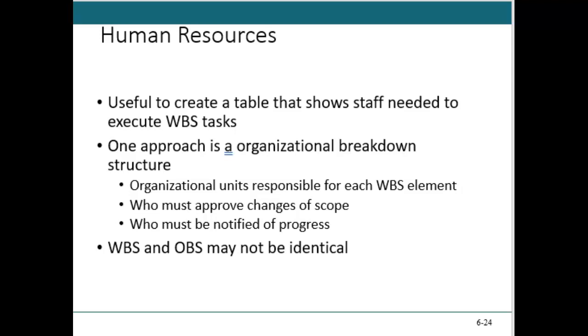The work breakdown structure is only about the scope. The OBS is about the human resources that apply to that scope. So an organizational breakdown structure is similar to a work breakdown structure, but the WBS is about the scope, breaking it down into deliverables, and the OBS is about resource management.